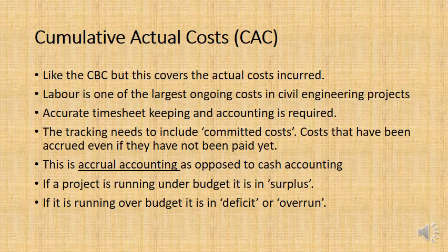Now, labour is one of the big ones. I've given you the example of me as a subcontractor, but for most labourers, even if they are employees and not subcontractors, they get paid once a month. Now, what's going to happen if during the first 2 weeks you actually work the labourers overtime, and you are looking at the cost benefit curve, the liquidity test with the